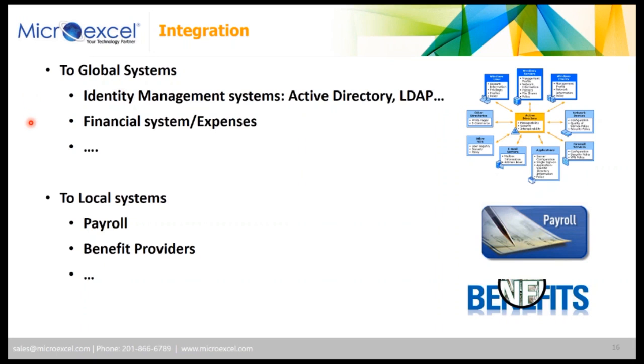It can be your financial systems, your expenses systems, any global system that is using HR data should be populated directly from your central SuccessFactors database. Then comes the complexity of the local systems. Depending on the customers, some want to have SuccessFactors as the master, and therefore, by using Employee Central in SuccessFactors as the master core data, we will have to interface back into the payroll system, or even if we use the benefits module, for example, we'll be interfacing to benefit providers.